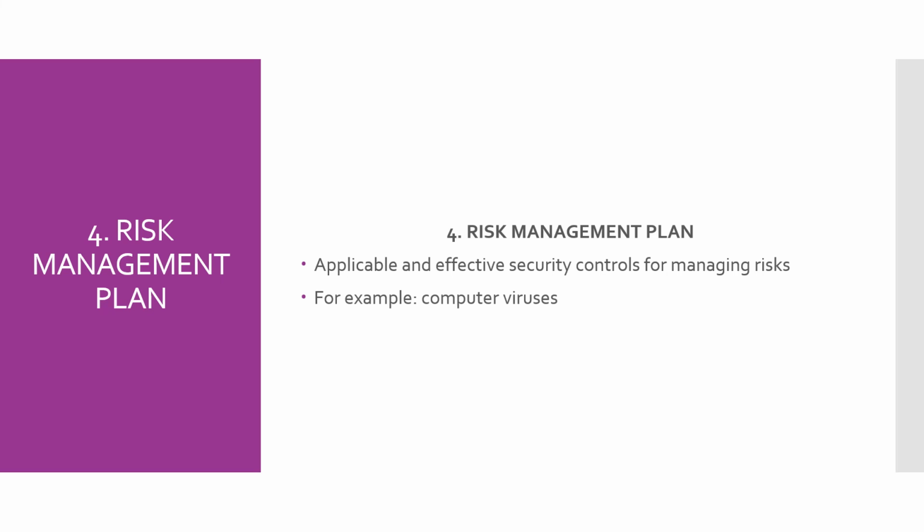Same thing, a good risk management plan should contain a schedule for control implementation, and it should be under the responsibility of a person to carry out this plan. Then only we will know whether this risk management plan is effective or not, or how far it has an impact on that particular risk or problem.